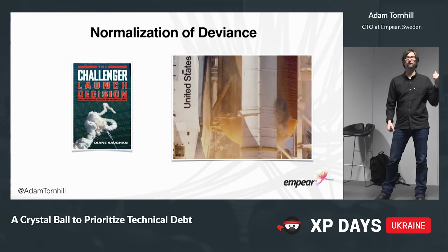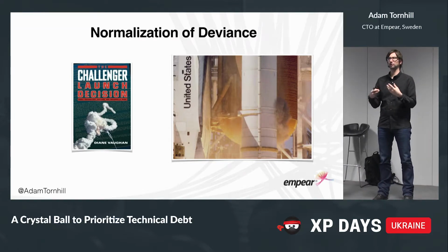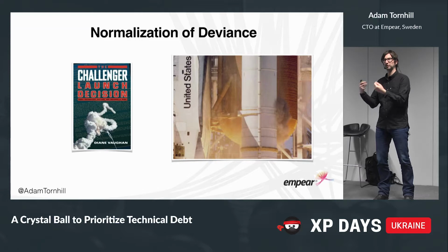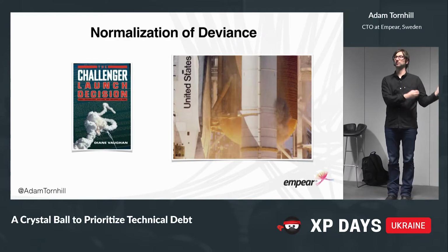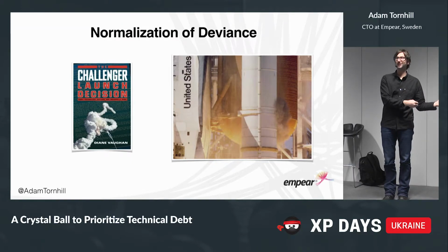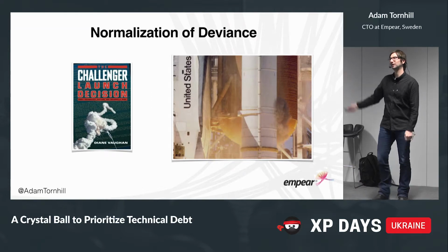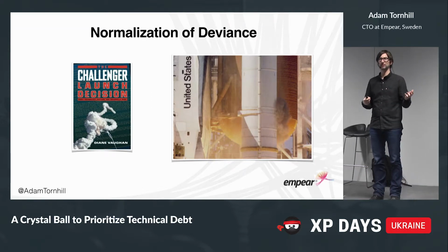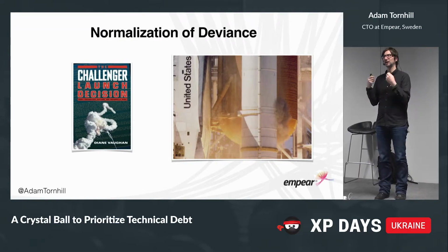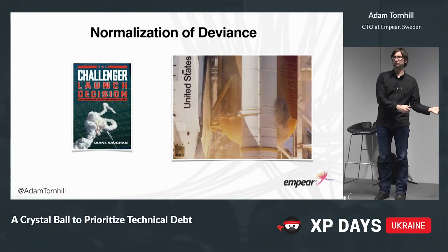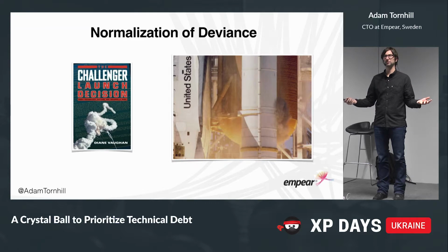Years later, during the first in-flight tests of the space shuttle, again it turned out that the solid rocket booster joints deviated from the predicted performance. Again, the problem was discussed and passed off as an acceptable risk. And it went on and on like that for years, before, even on the very eve of the final launch, there were some concerns raised by some of the engineers due to the unusually cold temperatures in Florida at that time. And again, it was discussed and passed off as an acceptable risk. And the consequence was a tragic loss of lives and a spaceship.